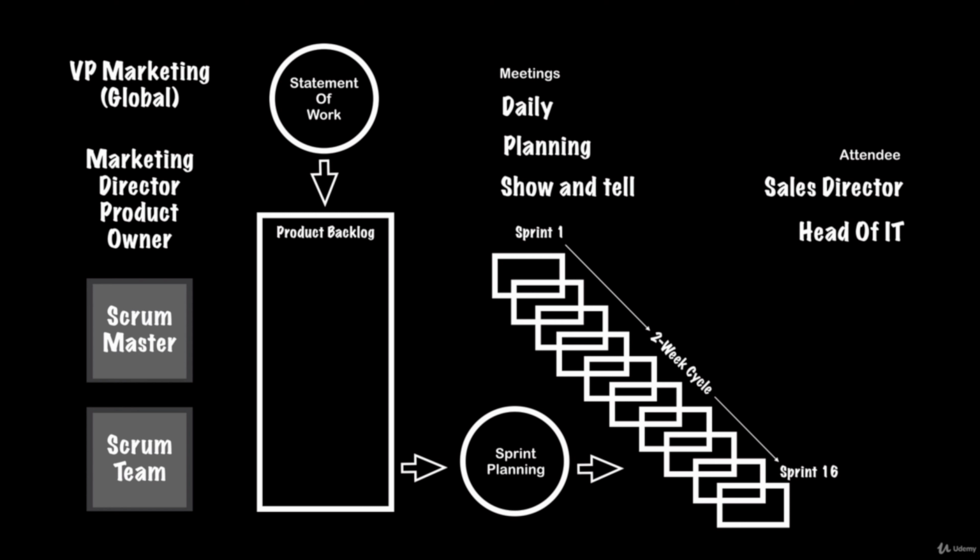So capacity management is also very, very important to give way for unexpected tasks coming into the team. That's one thing that we learned as well. We didn't work at 100% capacity to give room for people to take on important tasks. So if something urgent came in from the VP of marketing that needed to be added to the backlog, or during the sprint, we had the flexibility of taking stuff away from the sprint back into the backlog and then into the sprint.